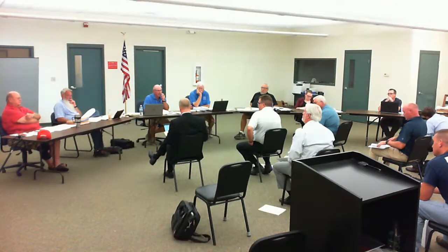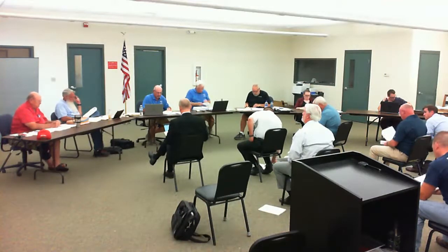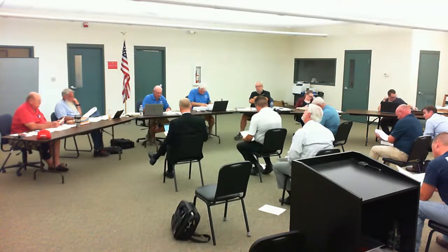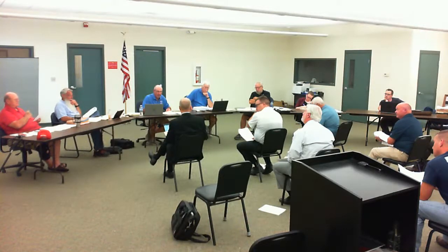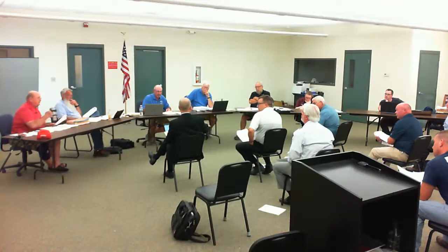So, on page 9, at the bottom right, project option 1, we see that you have $1.443 million per year left over to fund capital. Well, if this was put into effect and you had the bond debt service and you're still paying the same cost for all the operations and maintenance, if there was a decline in revenue, the area that it's going to hit is that. So if there's a big decline of $500,000, you're going to do less capital spending.